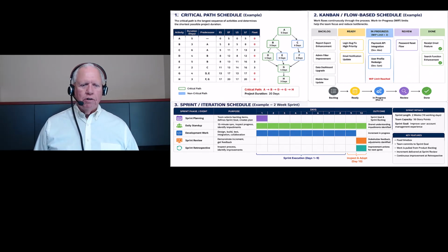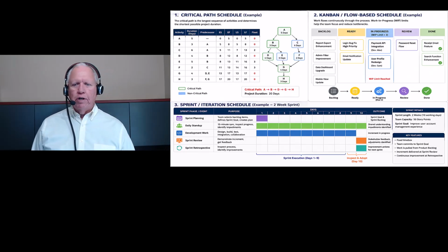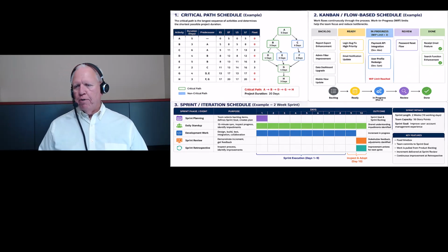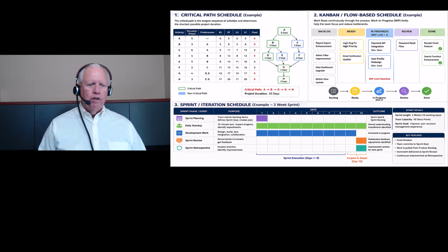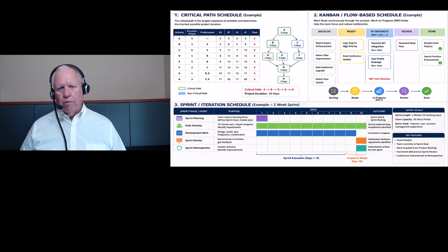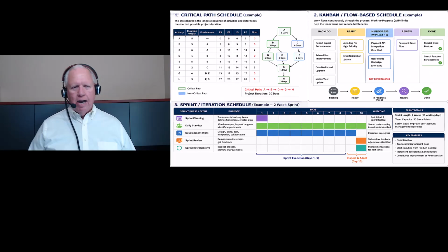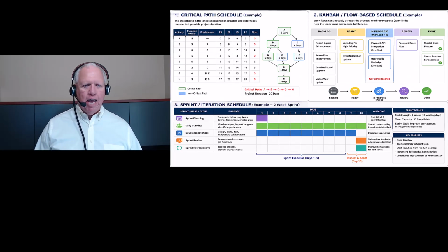And so what you're noticing here is sprints that you are starting to run and how long those sprints are going to run. A couple of things about sprints that will help you as you look at this. Your sprints are going to be typically 1 to 3 weeks. And the other thing is, once a sprint begins, it does not allow changes to happen inside that sprint until it's over with.